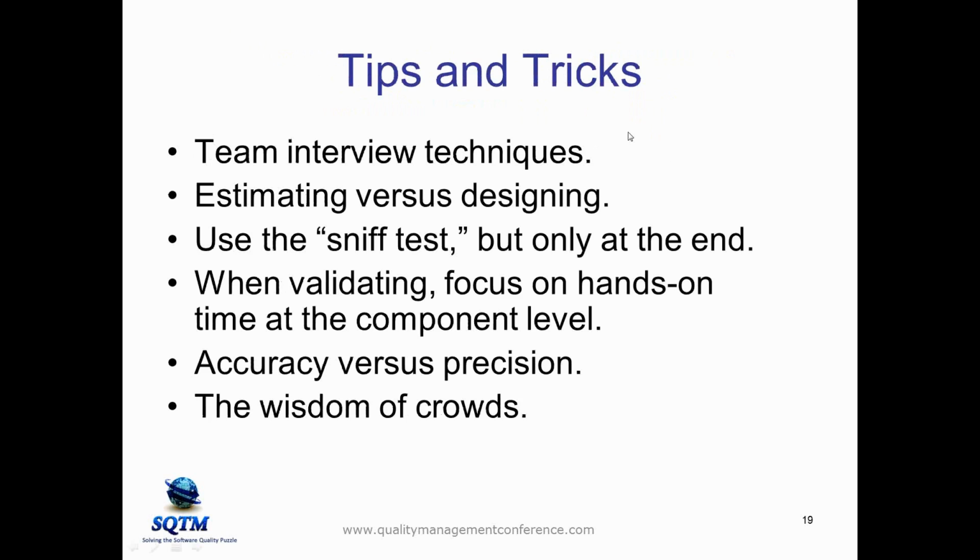And let me share some tips and tricks very quickly. Team interview techniques. Basically, if you're going to have multiple estimators doing an interview, the best approach is to have one person at a time be the lead, do all the talking, and everyone else keeps completely quiet.